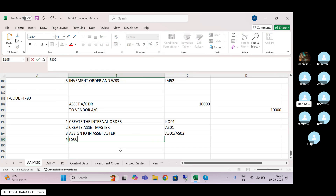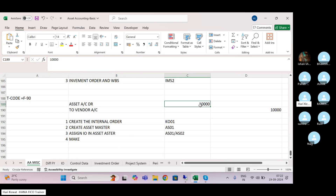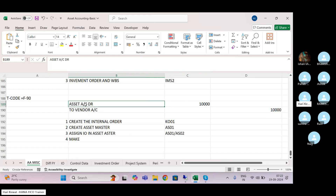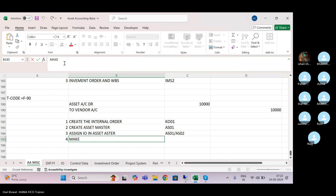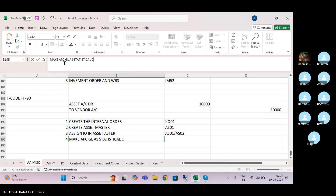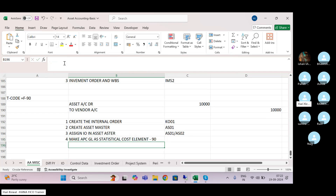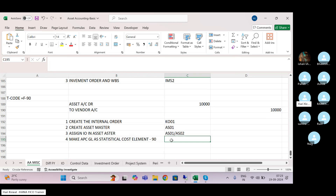Step four — this is very critical: you have to go to FS00 and make the asset GL a statistical cost element. For this asset — let's say you are purchasing a plant — take the plant-related reconciliation GL you have used in AO90. Go to FS00 and make that APC GL a statistical cost element.